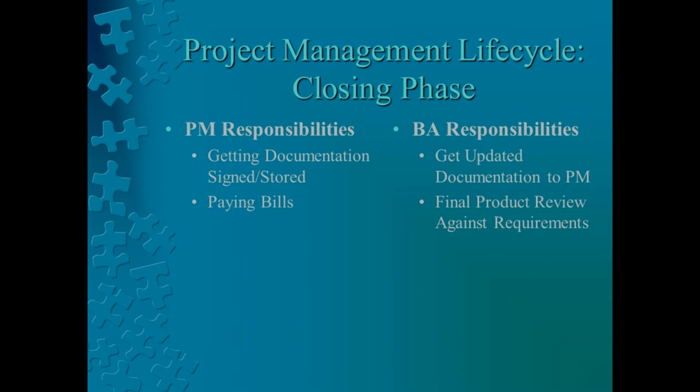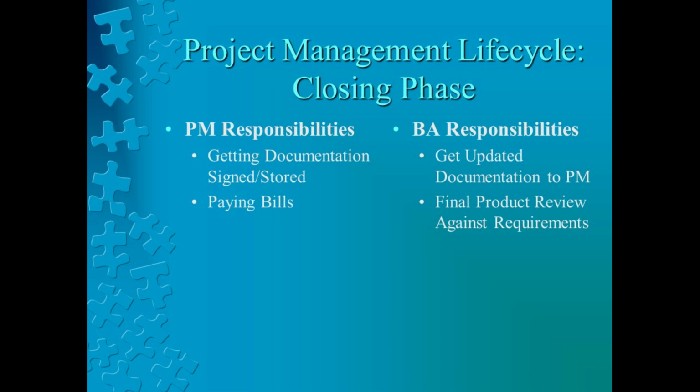The closing phase. During the closing phase of a project, the project manager is responsible for ensuring that all documentation is signed and stored in the appropriate location, and ensuring that all bills get paid. The business analyst, on the other hand, is responsible for ensuring that all of her updated documents make it into the hands of the project manager, and for making a final lap through the project from a requirements perspective to ensure that nothing was missed.